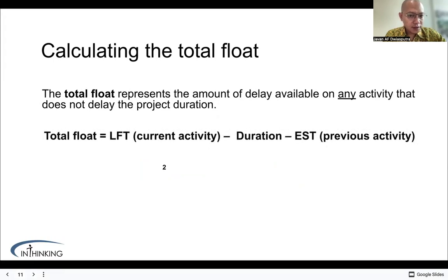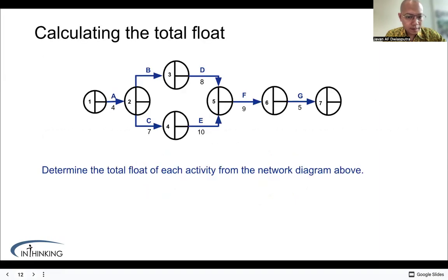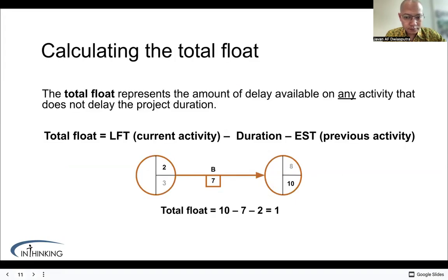Free float is slightly different. The free float means the delay allowed without delaying the next activity. The free float is the EST of the next activity minus the duration and minus the EST of the current activity. Free float helps managers understand flexibility between tasks.